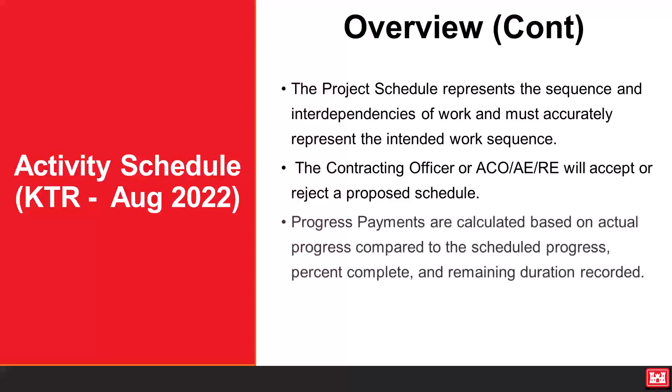Progress payments are calculated on actual progress compared to the schedule progress, percentage complete, and remaining duration recorded.